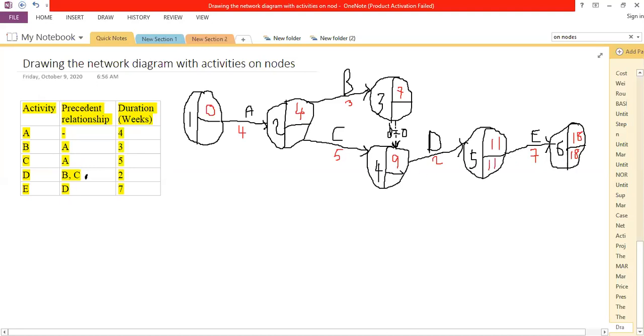Here again, I have got only one arrow coming from this circle, number 4. So as I move into it, and remember backwards, I'll take 11 minus 2, this will give me 9. Then here I have got only one arrow again, 9 minus 0 is 9.